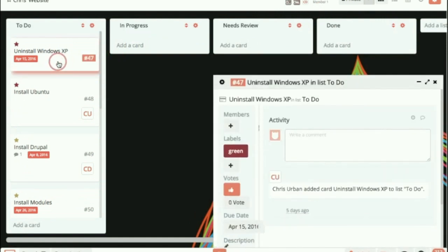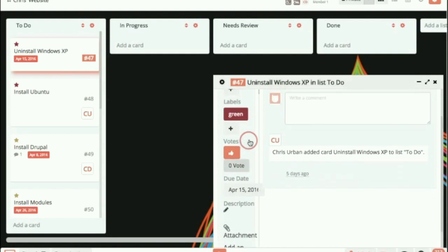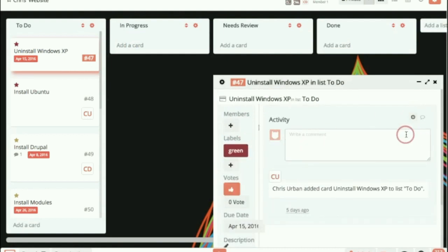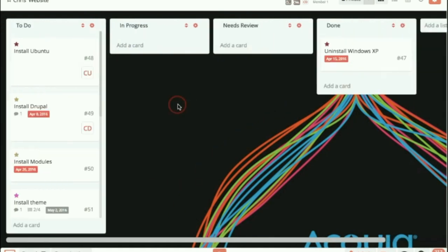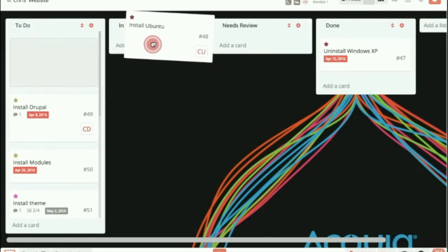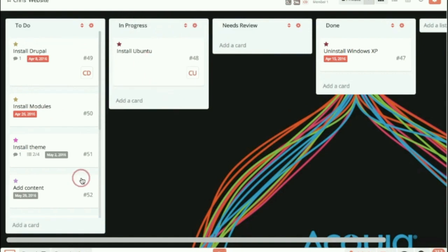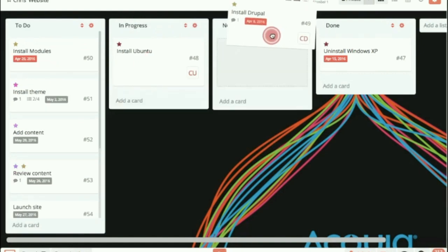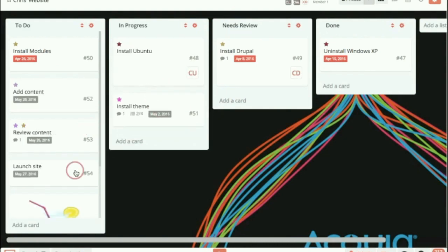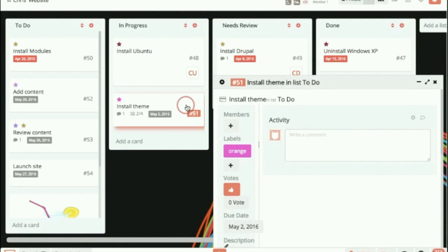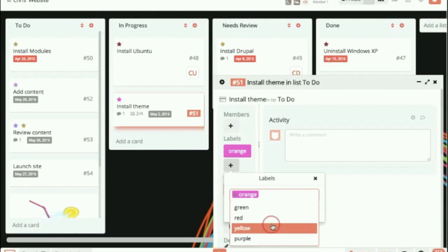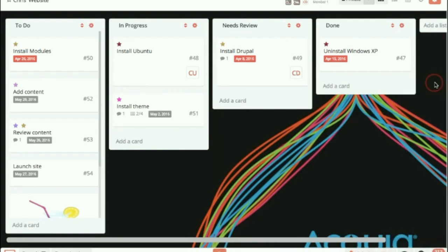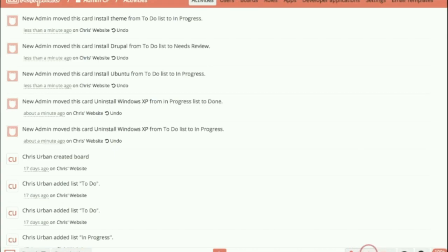So the same thing, there are cards and columns. You can assign the cards, you can assign labels. The catch with this, though, is that they do not come over cleanly. The JSON doesn't include what your custom titles are. It'll just label them as green, yellow, magenta, so you do have to go back and fix those. Not a deal breaker. But it, too, has upvoting and activity logging, and you can filter all of this within the card. You can view the tasks per person. There's a lot more in Restyaboard of the things that you wish Trello had added. So if you are a power Trello user, I strongly suggest taking a look at it.